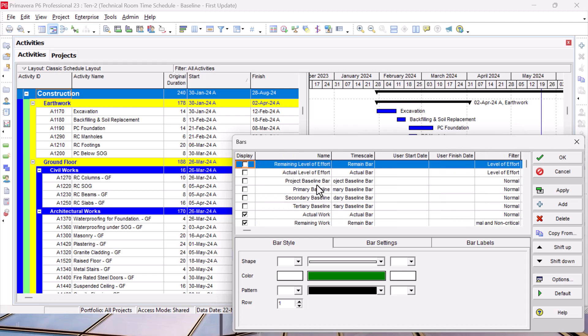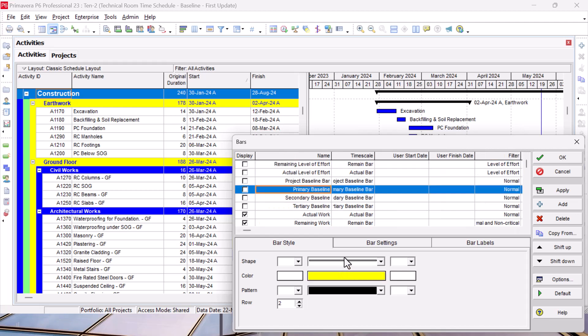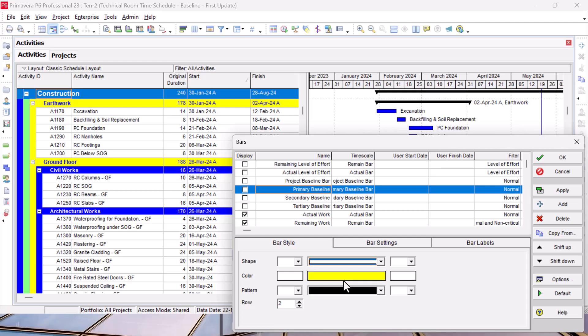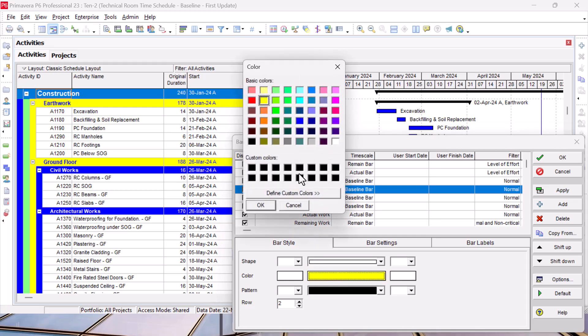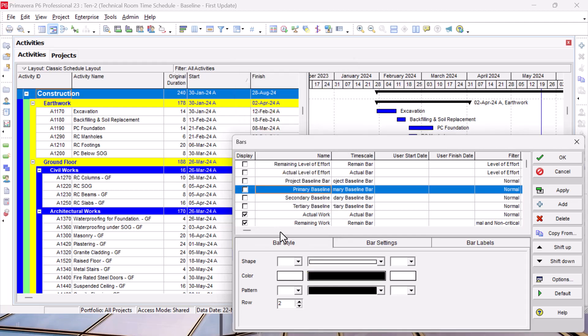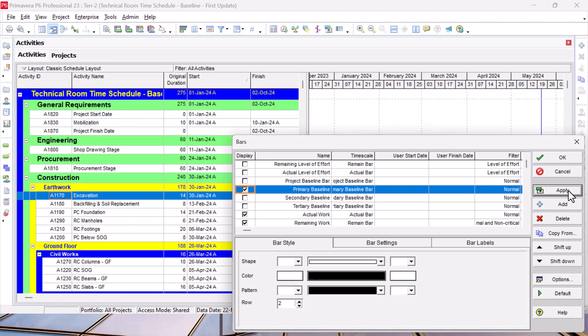Now right-click Bars. As you can see here, we can enlarge this one a little bit. I need the primary baseline. I will choose the width of it. I will choose the color as black. Then I will choose to display and I will click Apply.